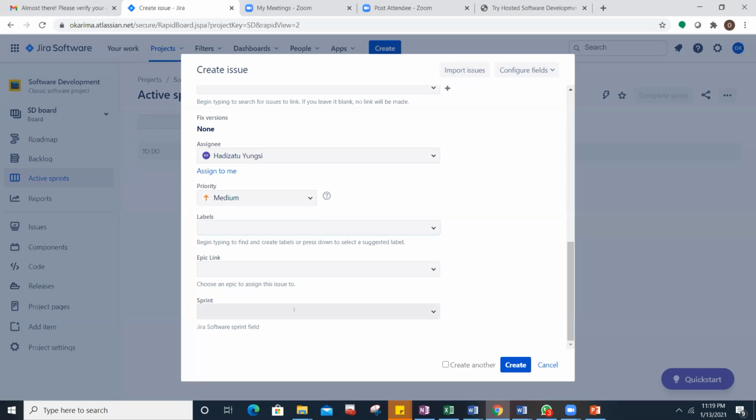So Agile says that if they are developing an app, you know how projects used to be written from beginning to end, then given to somebody to implement, and the person will start implementing from scratch, and when he ends, he will hand it over. That's not Agile. Agile says that they prefer a little functionality over comprehensive documentation, which means that when they start designing an app, even if it's just the login that they have finished designing, they will release it into production so that users can use that login. Because of that, they release in sprints, and a sprint is 2 weeks.